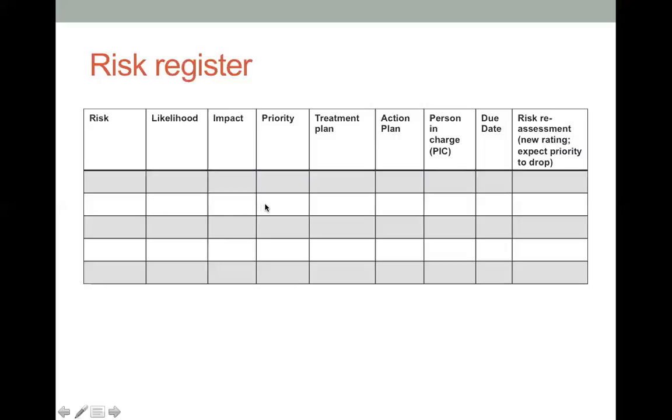Of course, 20 is higher than 5. Therefore, the first risk event would be priority number 1 for us, and the second one would be priority number 2 for us to manage. So that helps us understand the priority of the risk. That's basically the risk level that we need to include in the risk register, and this is the final product after you complete Assessment 3.